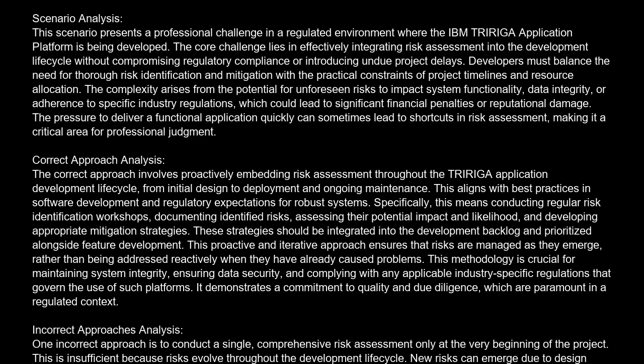Incorrect approaches analysis. One incorrect approach is to conduct a single, comprehensive risk assessment only at the very beginning of the project. This is insufficient because risks evolve throughout the development lifecycle. New risks can emerge due to design changes, integration challenges, or evolving regulatory landscapes. Failing to reassess risks periodically means that potential issues might go unnoticed and unaddressed until they become critical problems, leading to potential noncompliance and system failures.